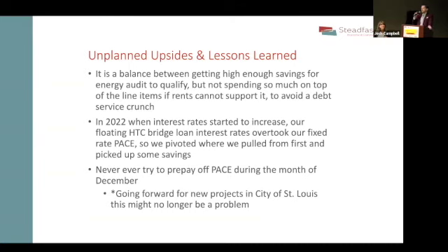The fixed rate was very important. Those bridge terms that float during construction almost doubled in about a year and a half. And with Missouri, you've got to apply to the state. There's this lead time between when you're done with the project, getting through SHPO, which was incredibly backed up, and then getting your tax credits monetized. That was a nail biter across the entire project.